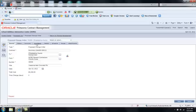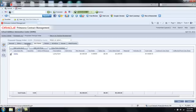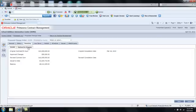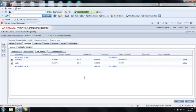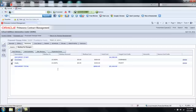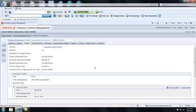If I go to the line items, I can see my line item is here with that $4,300 from Ace Mason. To view the markup details, I can click the Summary tab, select Markup for Changes, and I'll see all of those various markups displayed. In fact, I could edit the markups from this tab. I'm going to Save. So I've just viewed my proposed change order. I'm now going to return to Change Management.